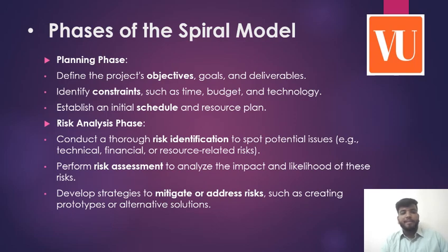Second is the risk analysis phase. First is conduct a thorough risk identification to spot potential issues, for example technical, financial and resource-related risks. Second point is perform risk analysis to assess the impact and likelihood of these risks. Third point is develop strategies to mitigate or address risks, such as creating prototypes and alternative solutions.